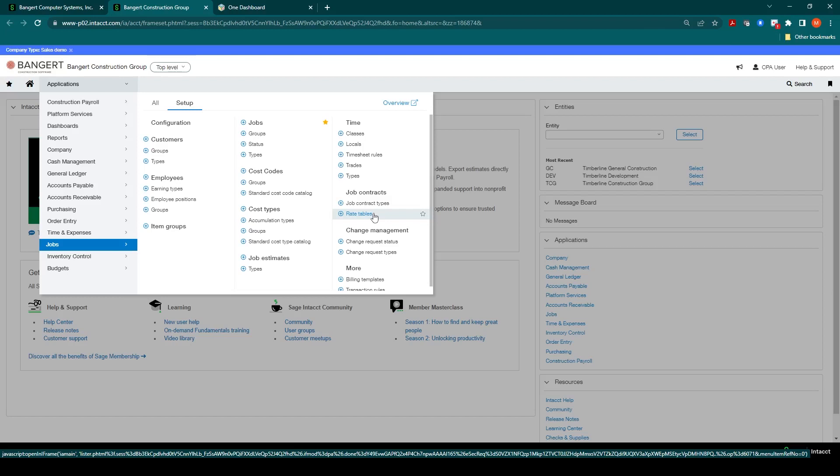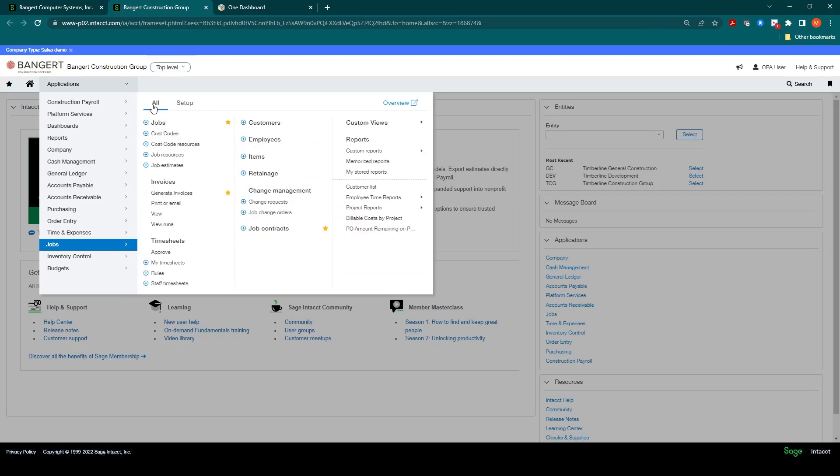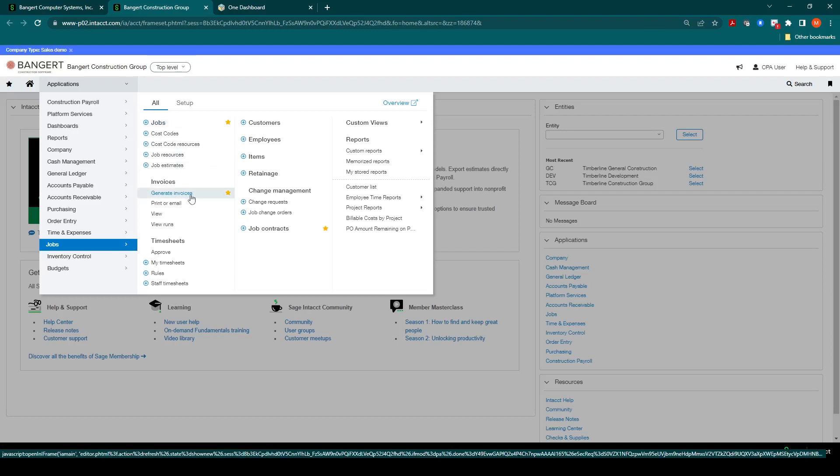Once the contracts are set up, the user will be able to generate invoices. This is done through jobs, all invoices, generate invoices.